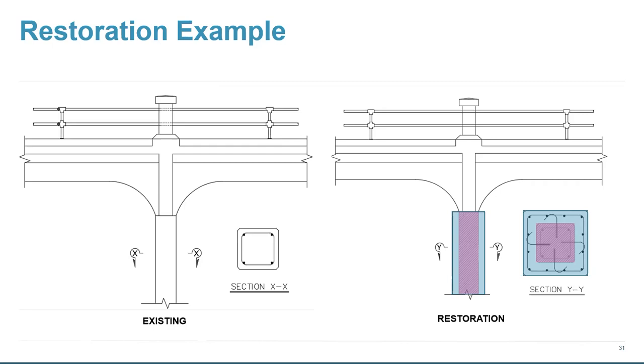And again, in terms of the construction staging, it could be tough to try to do the pier after all that work's done. So the going thought is maybe the pier would be built first before those improvements. But again, we're looking at everything.